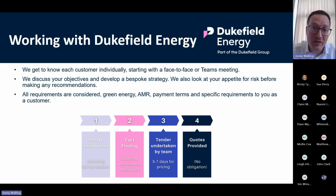After that, any refreshes, as we call them, can be done with normally 2 or 3 working days notice. Again, the more notice we can give to suppliers, the higher probability we get of them giving us quotes when we ask for them. Normally the way it works, after maybe 1 or 2 rounds of pricing, it's normally the same suppliers that are going to be the cheapest, so we start discounting some of the more expensive suppliers, and then narrow it down to maybe 1 or 2 suppliers with a view to signing off on a specific date.